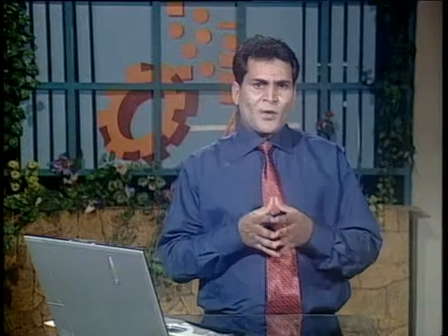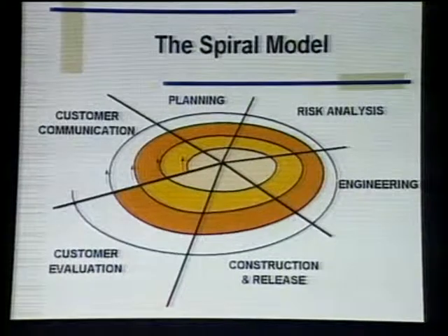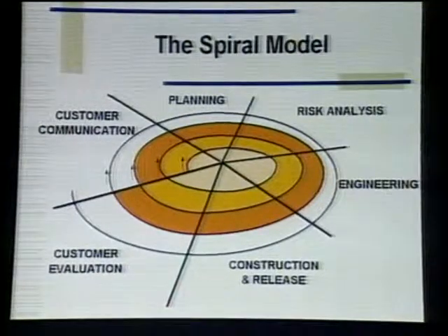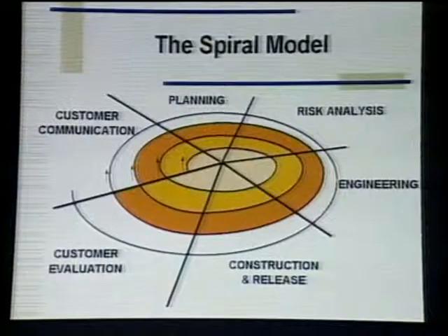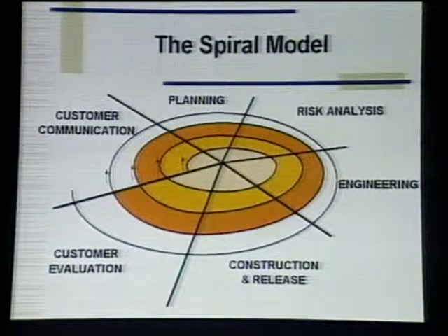Dear students, during these steps, the first step is very important, which is the customer communication. Like all other models, you cannot build a software until you have the user requirements. So the first step has to be that you communicate with the users, get their requirements, get their feedback, ask them what they really want. Whatever requirements you get in an iteration, you do the planning. You decide whether we should be developing that part of the software or not. And if this software is to be developed, then how it should be developed.